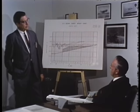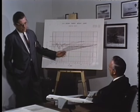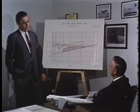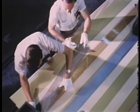Keeping a close watch on the weight of all C-5 components is Lockheed's Whit Holland. "And as we discover certain components that we can redesign lighter via more expensive material or otherwise, we store these in this bank. Then we know exactly where to go when we need to cut some weight. Our move to titanium is one example."